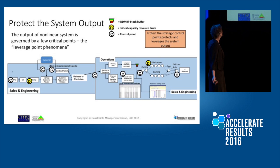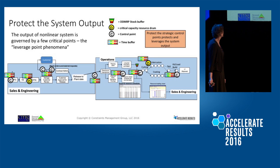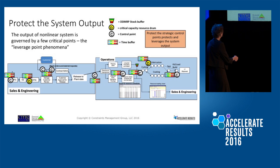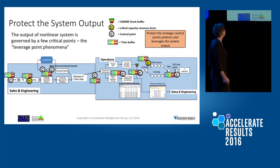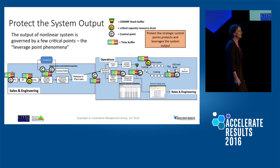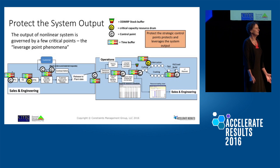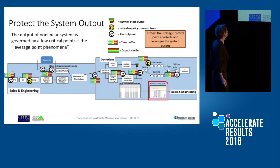So this is what it looks like for this little world. Notice I do have a stock buffer right here. They swore up and down their projects were all unique. When we went through and looked at their materials, there were about 20 different items used on about 70% of all jobs. By stocking those, we didn't have any lead time issues. People think they're unique, but they're really not.